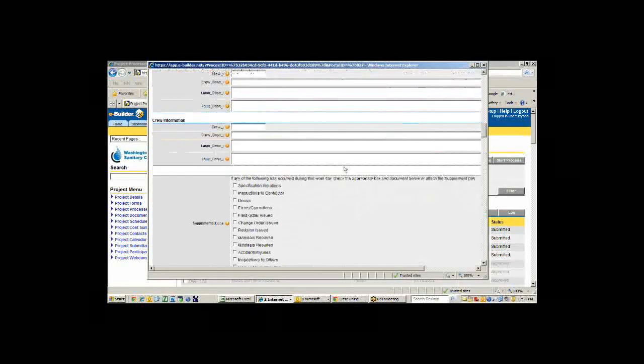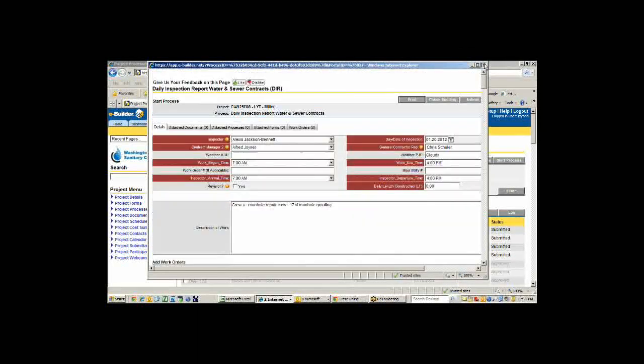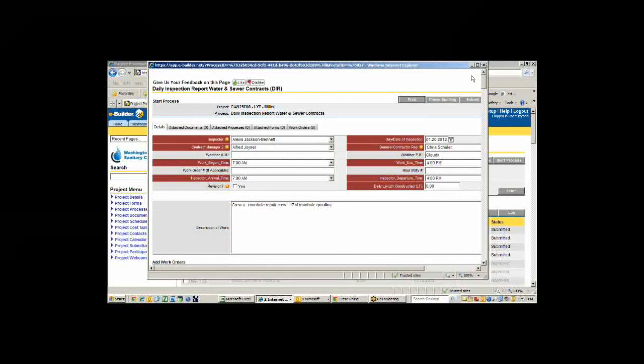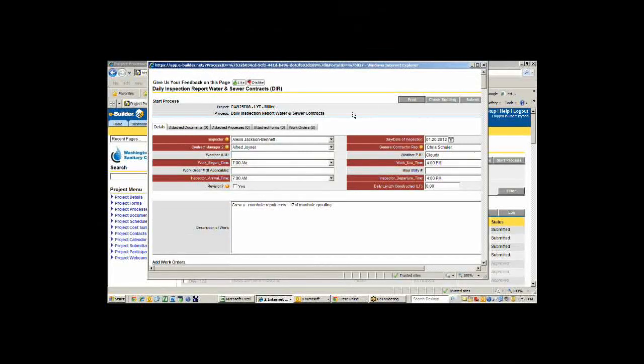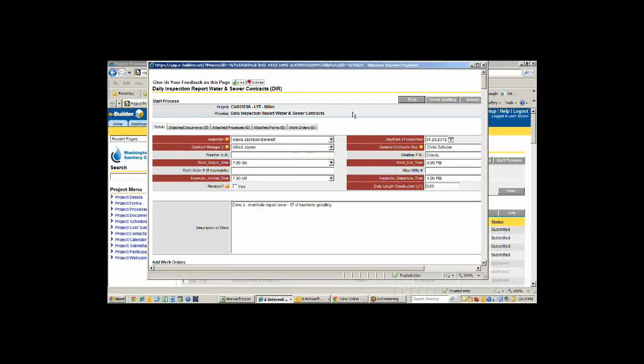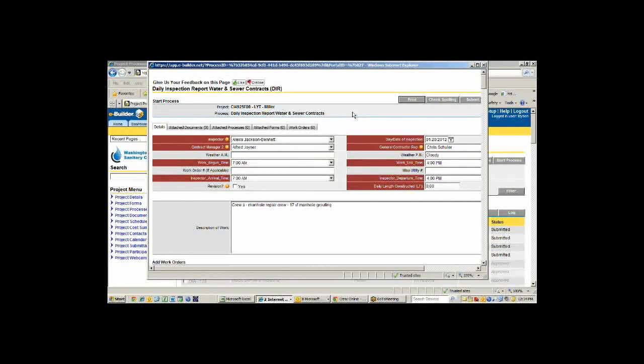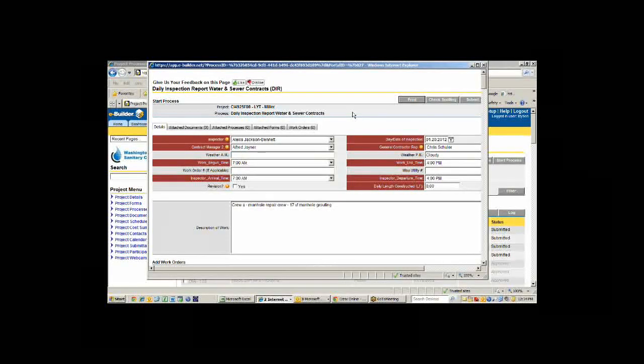Once they've entered all the quantities for that particular contract, they'll go down to the bottom and submit that. That would become the daily report for that particular day for that particular contract. Does anybody have any questions so far? Okay, hearing silence, I'll move forward.